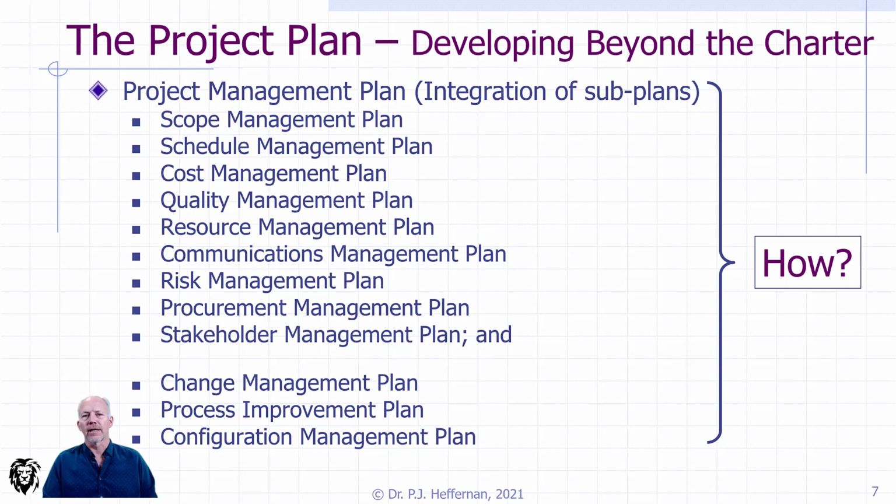Depending on the literature you're looking at, other plans are often referred to: change management plan, process improvement plan, configuration management plan. Certainly those, change management plan has to be done. You need to know how you're going to be managing changes, who's on your board to review the change requests, how they're going to get reviewed. So I throw these in here as potential plans that you may want to include as appendices and just isolate them because they weren't listed in the previous list.